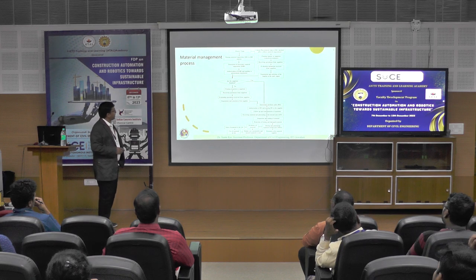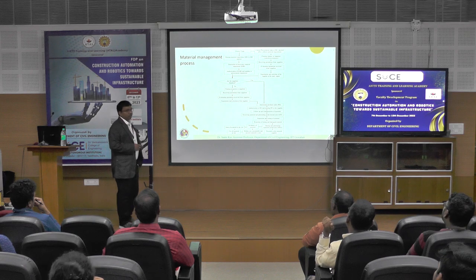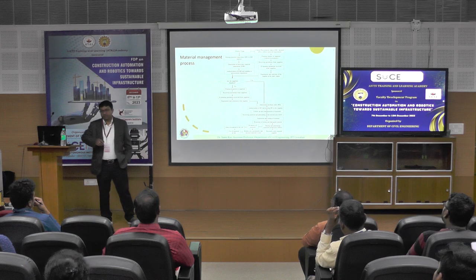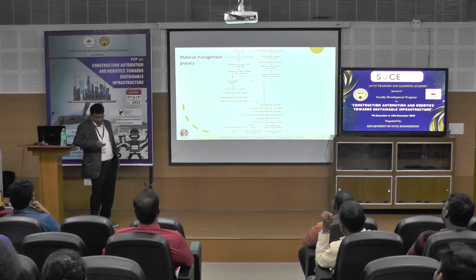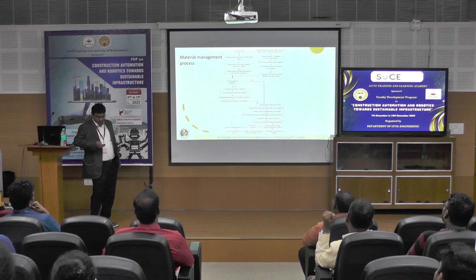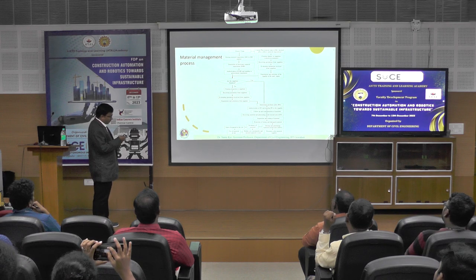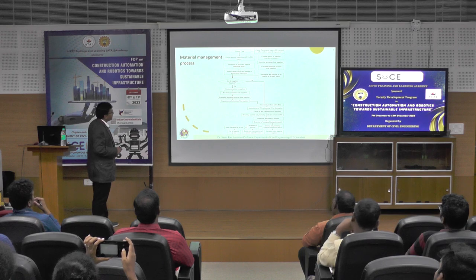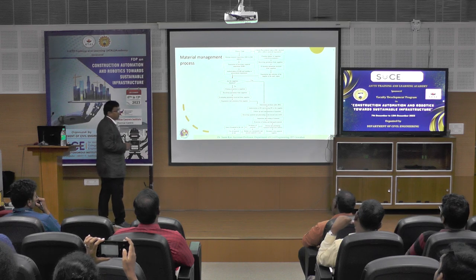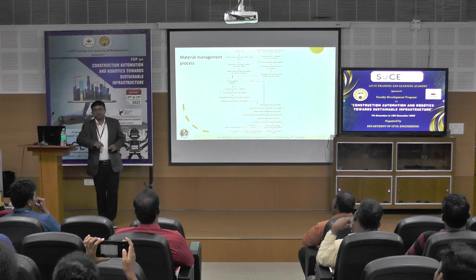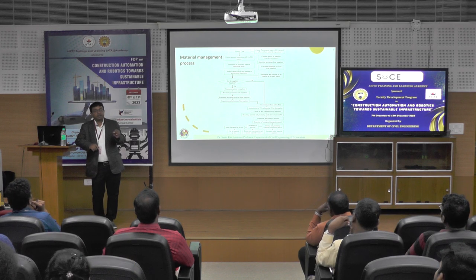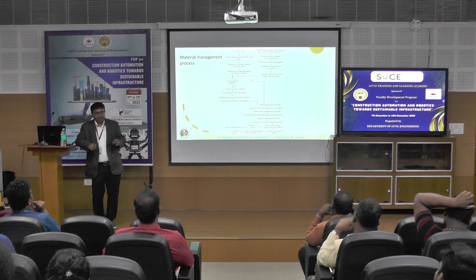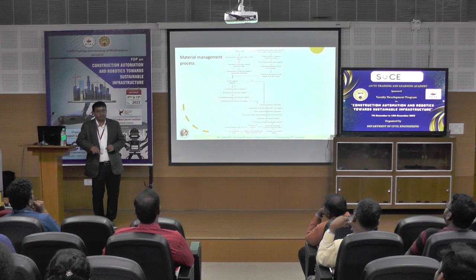To understand the material management process followed by the industry, particularly large construction organizations, we investigated and found that the project team initially raises a material requisition based on requirements. There is an MR register where construction managers or planning managers write what material is required and how much quantity. Based on that MR register, an electronic material requisition, or EMR, is generated in their system.